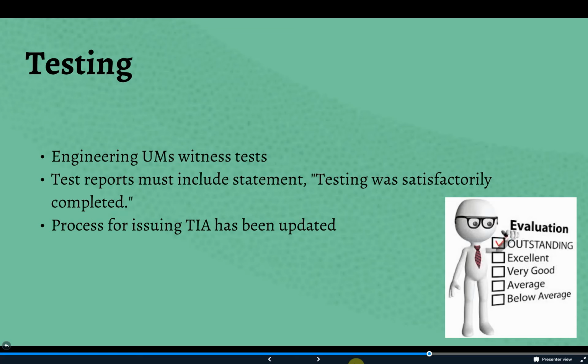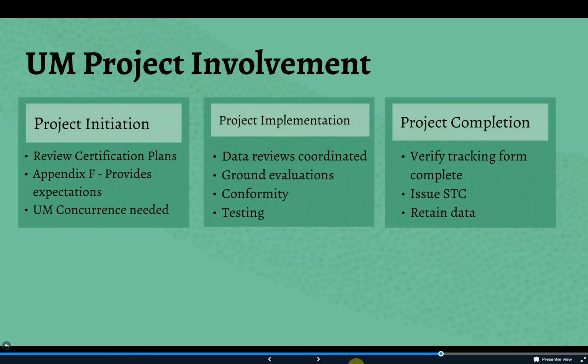As a rule of thumb, remember that Westar uses a 30-day line in the sand as the norm for shirt pocketing. When the project manager has completed his review of everything identified on the project tracking form and ensured all compliance has been addressed, he will coordinate with the project administrator so steps can be taken to complete the project. Project closeout includes reviewing the data presented by the applicant or project manager, signing the STC certificate, the 8100-11 statement of completion, approving the master data list, AFMS if applicable, and airworthiness limitations section of the ICA, assuming there aren't any new additions. All project records will be retained indefinitely on behalf of the FAA.